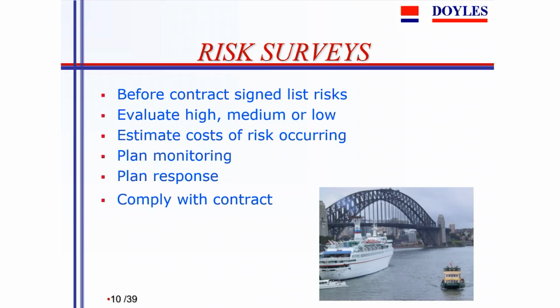However, it may be possible to get a bigger machine in at some time, or to undertake exploratory drilling ahead of the excavation so that one knows what one's encountering. So it's important to look at the risks that are on the project and the risks that the contract can make adjustment for. And the other aspect is you've got to look at compliance with the contract. There's a risk if your administration gets messed up, you can often be left holding a substantial portfolio of disadvantages if you haven't been timely in your administration.